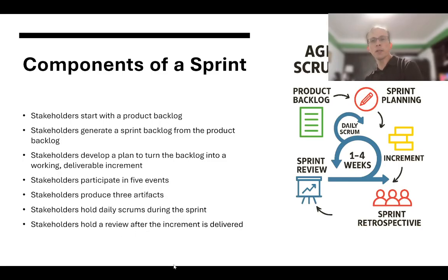Stakeholders, after the increment is done and it's been delivered, what is done? Done has a different meaning to different teams, but it probably means that all the critical testing has been completed for that particular sprint. That there are no known major show-stopping defects in the project. Doesn't mean it's defect-free necessarily, but nothing that would hinder the software from operating in any sort of minimally viable product way. Code reviews have been completed and passed. Approvals have probably been secured, that sort of thing.